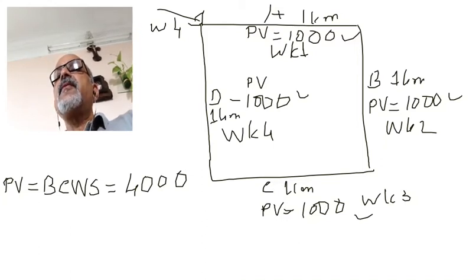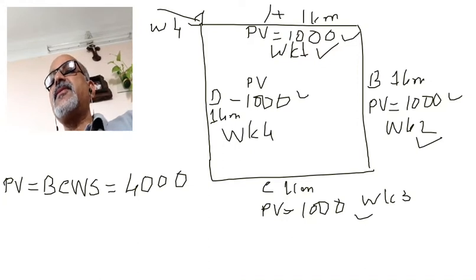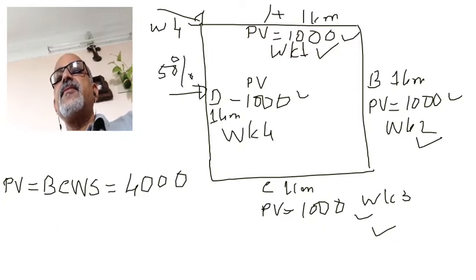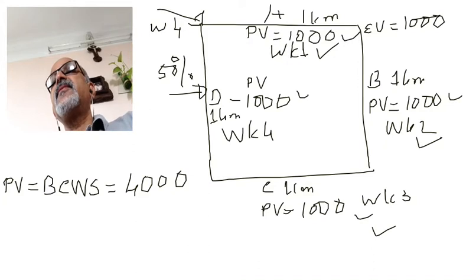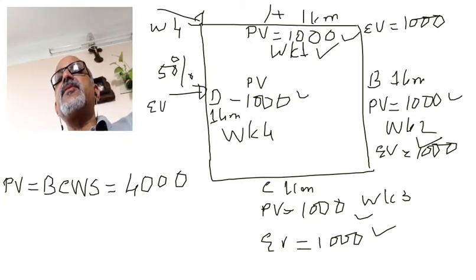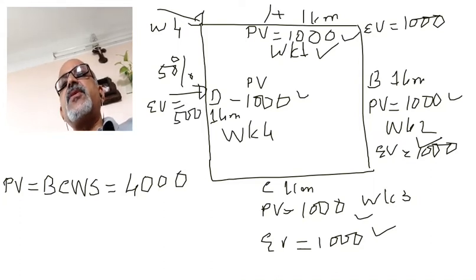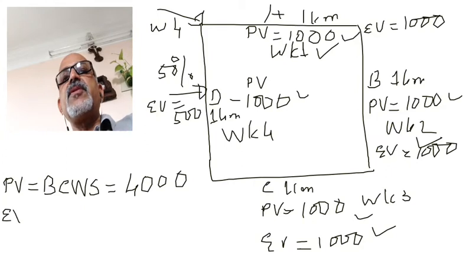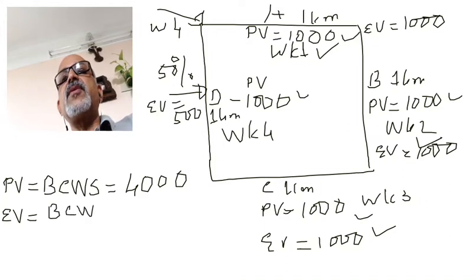Side A is done, Side B is done, Side C is done. Side D, however, is only 50% completed. So the earned value for Side A is $1,000, Side B is $1,000, Side C is $1,000, and Side D's earned value is 50% of $1,000, which is $500. The cumulative earned value, also known as Budgeted Cost of Work Performed (BCWP), is $3,500.